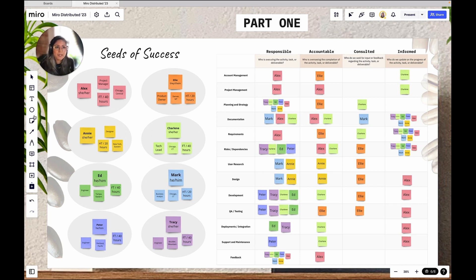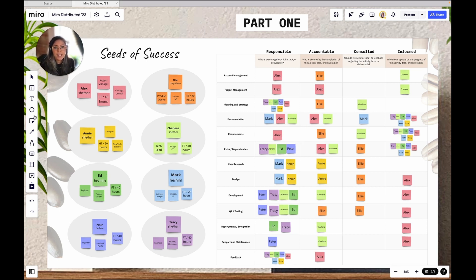I fill out as much as I know on the right-hand side. During the call, I give this section about 10 minutes — I give everyone a chance to introduce themselves, and then I give everyone some time to review the RACI matrix. I'll set a timer and ask people to edit as they see fit: if people notice they're somewhere they're not supposed to be, they can remove themselves; if they're missing in one area, they can add themselves. The idea is to make sure we all understand our roles and responsibilities.